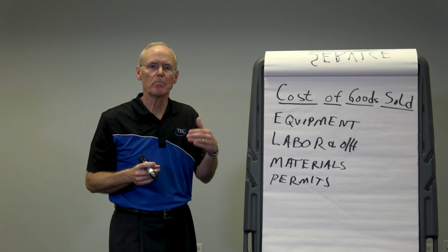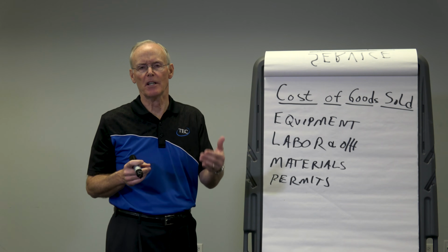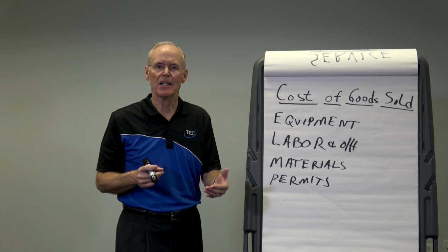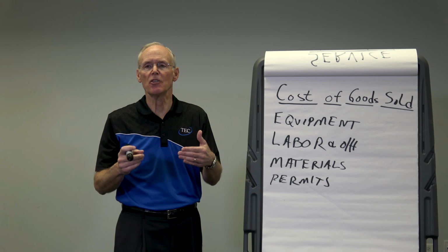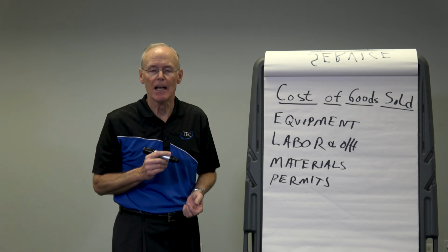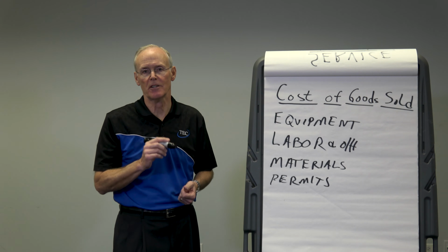Training is something you should budget for. If you pay your guys for training, I would put that under overhead, because it's not something you do only if you got the job. You don't put down training expense in your job estimate when you go around and look at the site.